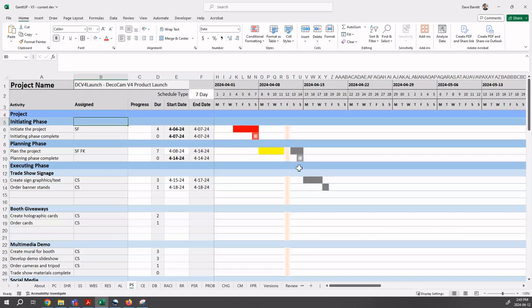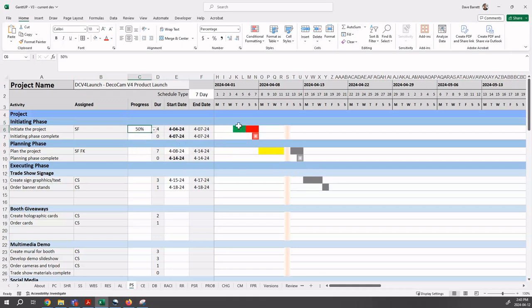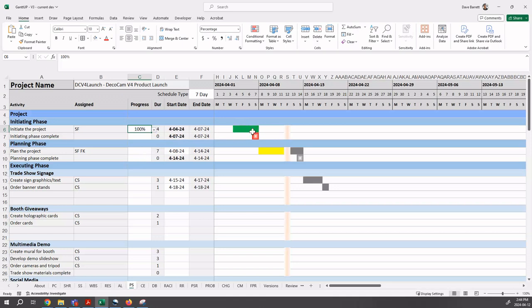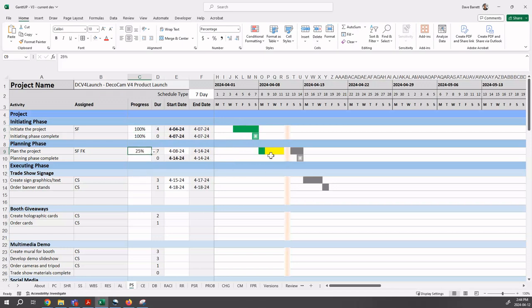Gray means future work that hasn't, it wouldn't necessarily be started yet. Now, the other color that isn't showing yet, but it will start to show is let's go back to the first one and say, well, we're actually 50% done. Now you can see that half of the bar has been turned green to say that that part is done, but we're still late on the other 50%, which is red. Let's say that we say it actually is done. Well, now the bar is green. Part of the activity is done, part of it is behind and part of it is still to be done.